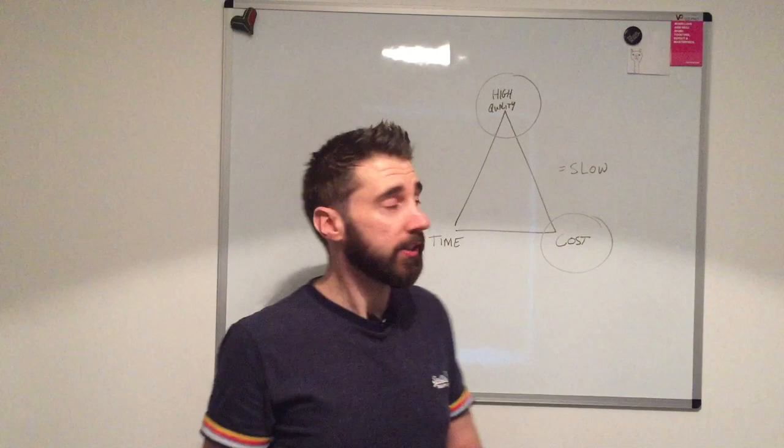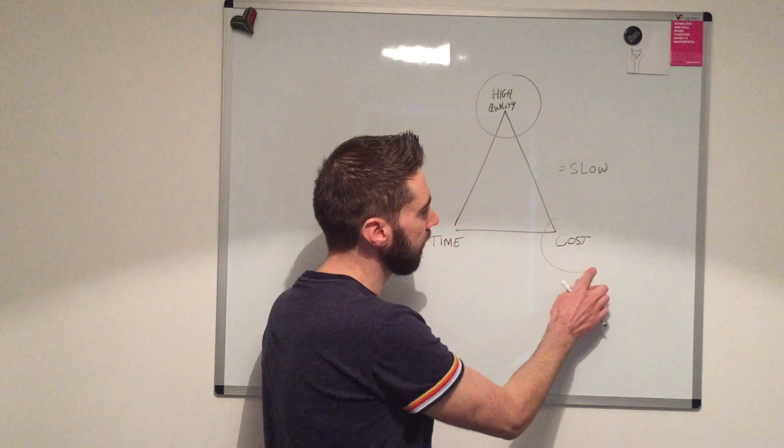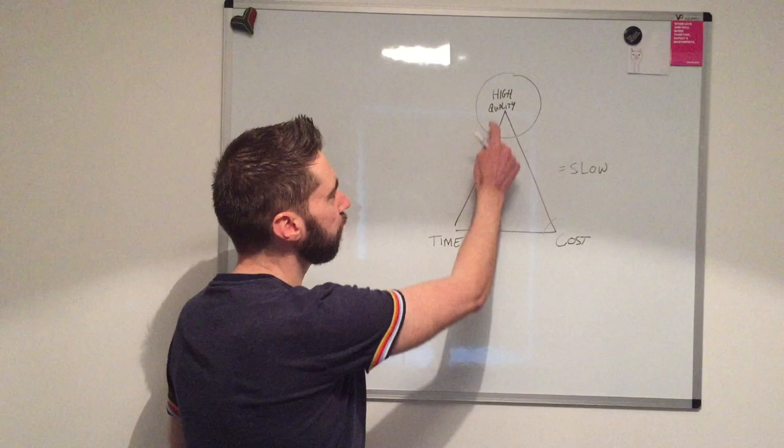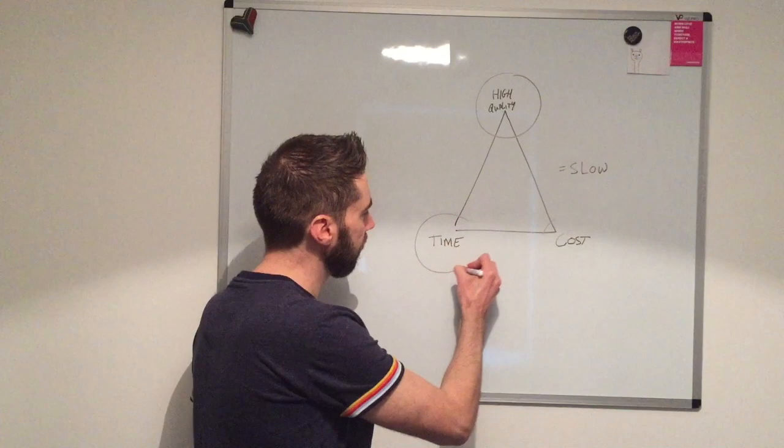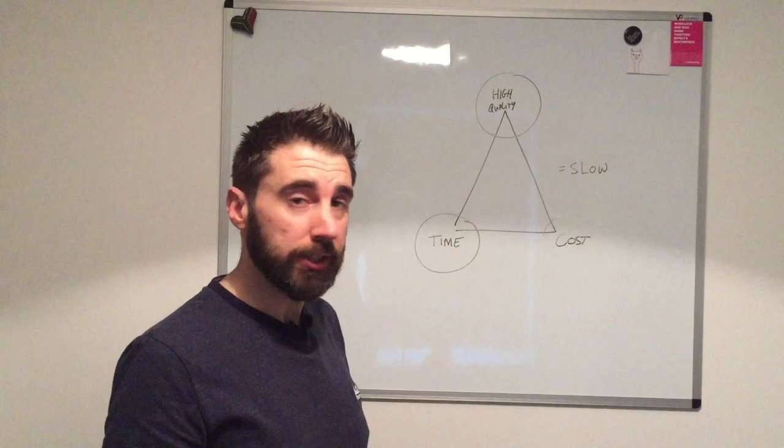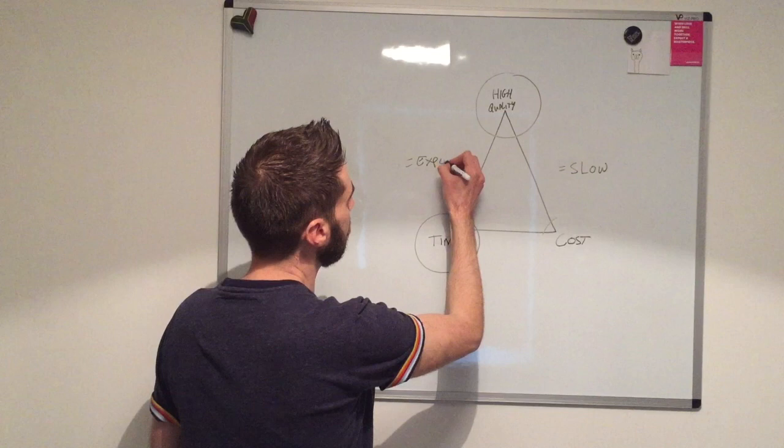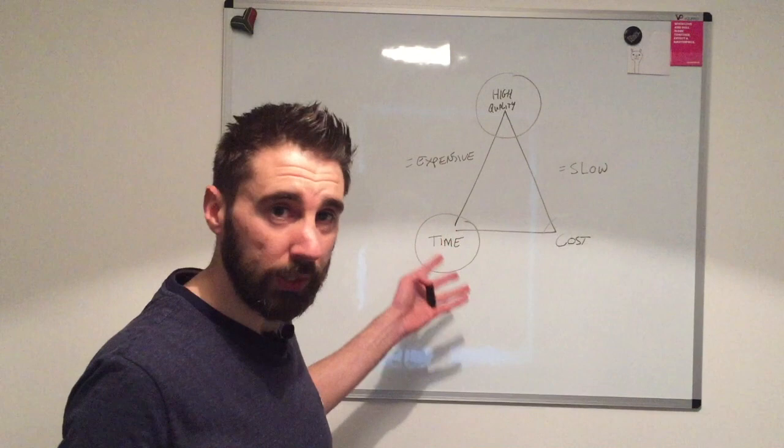Let's change this up a little bit. Let's say actually, you know, cost isn't really a factor. We've got the money. We want it to be high quality but we want it to be delivered quickly. So these are my two priorities. In this instance, this project is probably going to be quite expensive. Things that are delivered quickly and to a high standard typically come at a premium price.